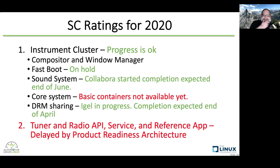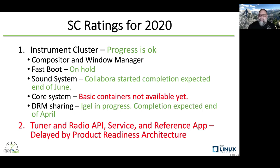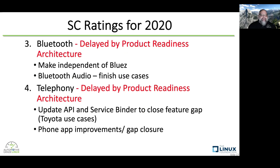Ranking from one to ten, the highest priority was instrument cluster. We made a lot of good progress in the instrument cluster last year, and even into this year — we let out some contracts for the sound system and for DRM sharing that are nearly completed. The sound system should be completed by the end of June. We had a tuner radio APIs and service binder and reference application — that was delayed by the product readiness architecture, the IVI expert group, and some decisions they needed to make. Bluetooth was again delayed by product readiness as well as some telephony work. In both cases, we did some updated use cases — we got use cases from Toyota for feature analysis and gap analysis.